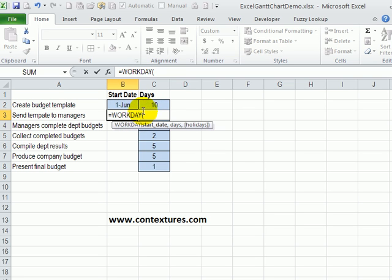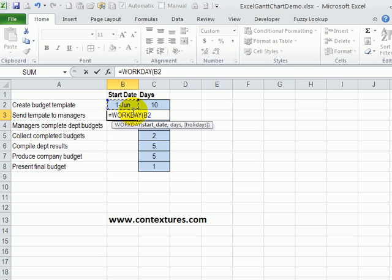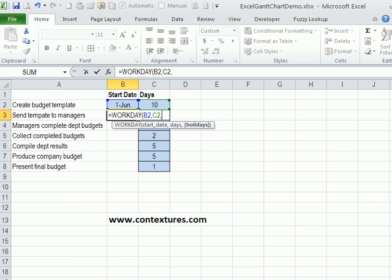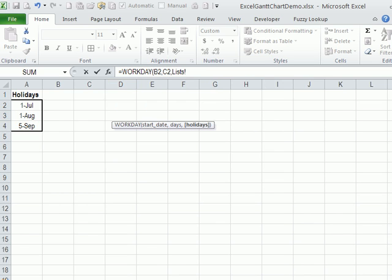So pressing tab to enter that function name, then the start date is the date of the previous task and a comma to do the next argument. And the number of days is 10. So this one will be 10 days after that previous task, then a comma, and our holidays. If you have a holiday list, you can use it or you can just leave this argument out if you don't have any holidays.